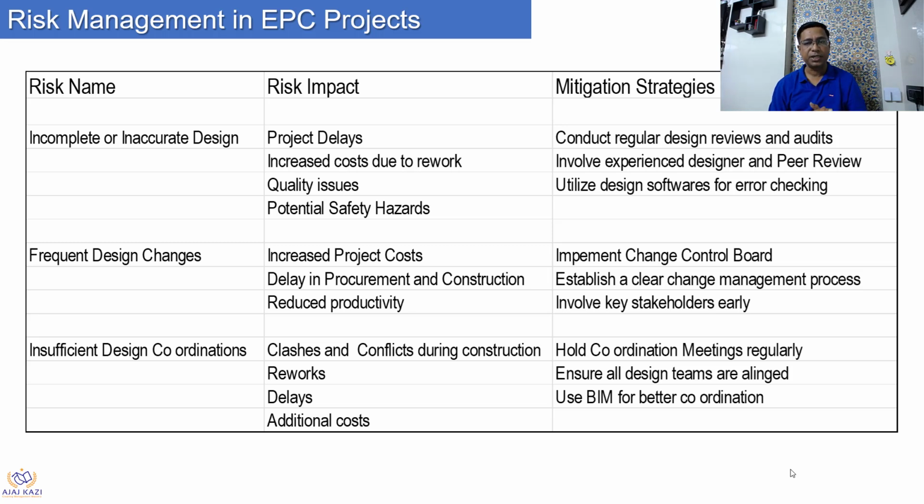How do we mitigate it? The first important thing on the project is to have a change control board which will approve the design change. Without change control board approval, you should not move ahead with design change implementation. So that is very important. Otherwise, everybody will start making changes and you will have no idea, and then we will get into major issues, right?